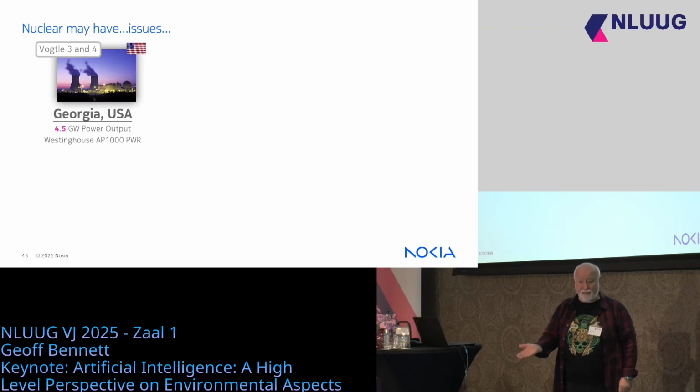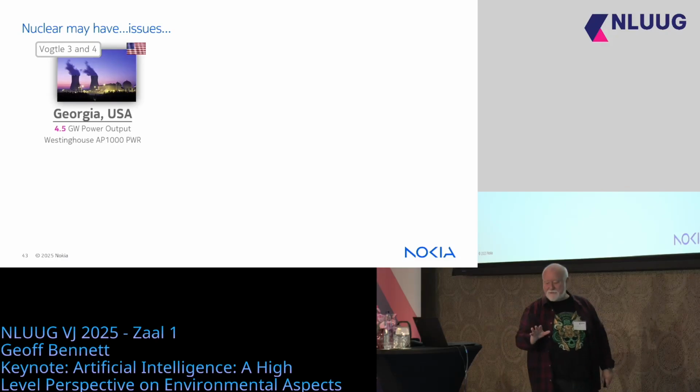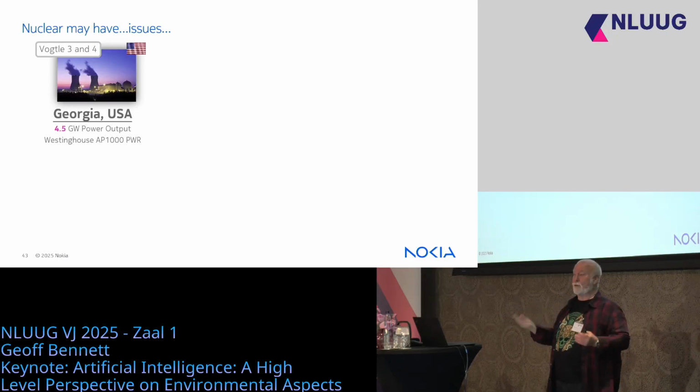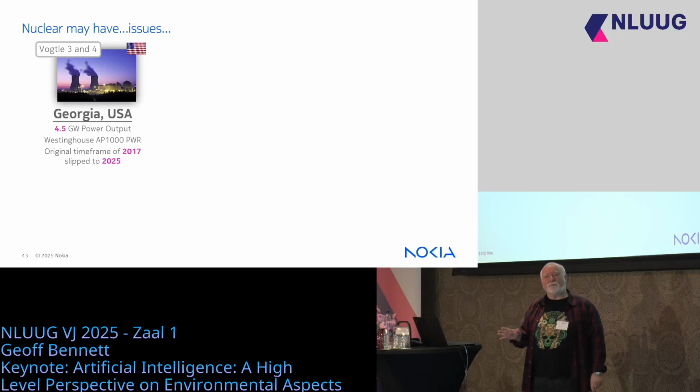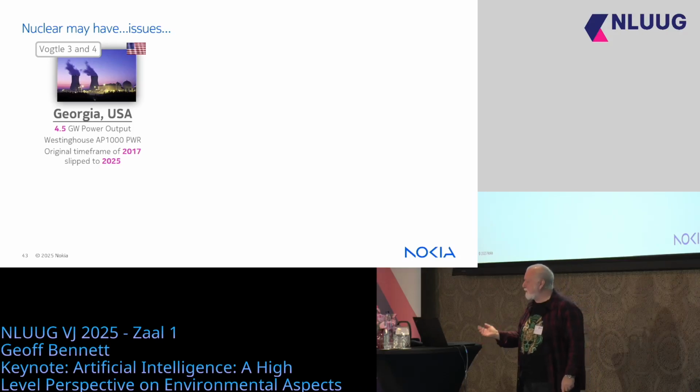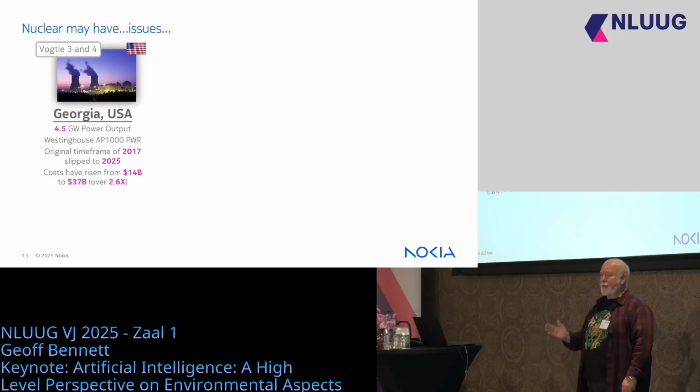If we look in the United States, the first time I gave this presentation, it was actually in Georgia. It was in Atlanta, at NLUUG. And they just finished the Vogtle 3 and 4 nuclear plants. They come on stream. So this is fantastic. 4.5 gigawatts of zero CO2 power. But the original time frame of 2017 slipped to 2025, an 8-year delay. And the budget was 2.6 times over its original budget. $37 billion, to the point where they're really worried that Georgia electricity customers are having to pay a lot more in their electricity bills to subsidize these plants.